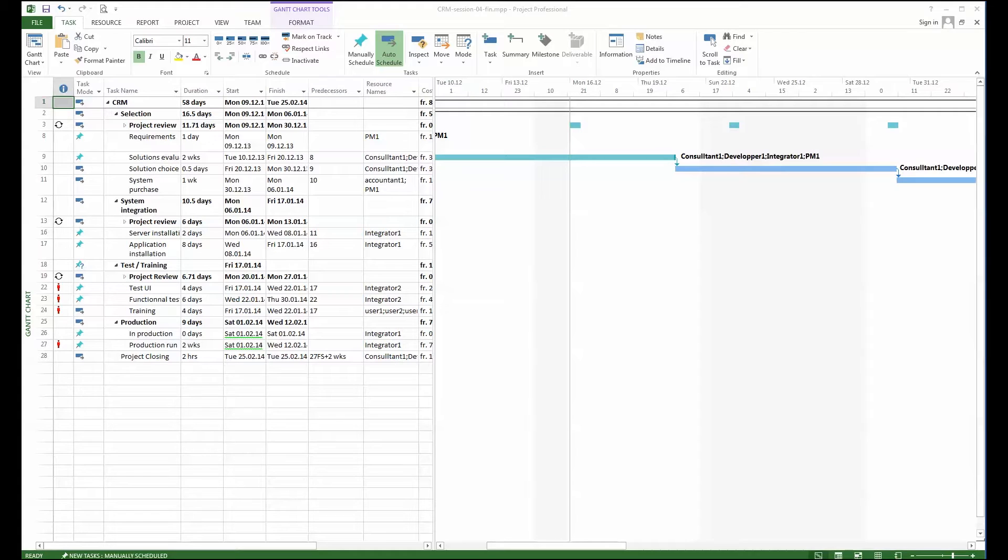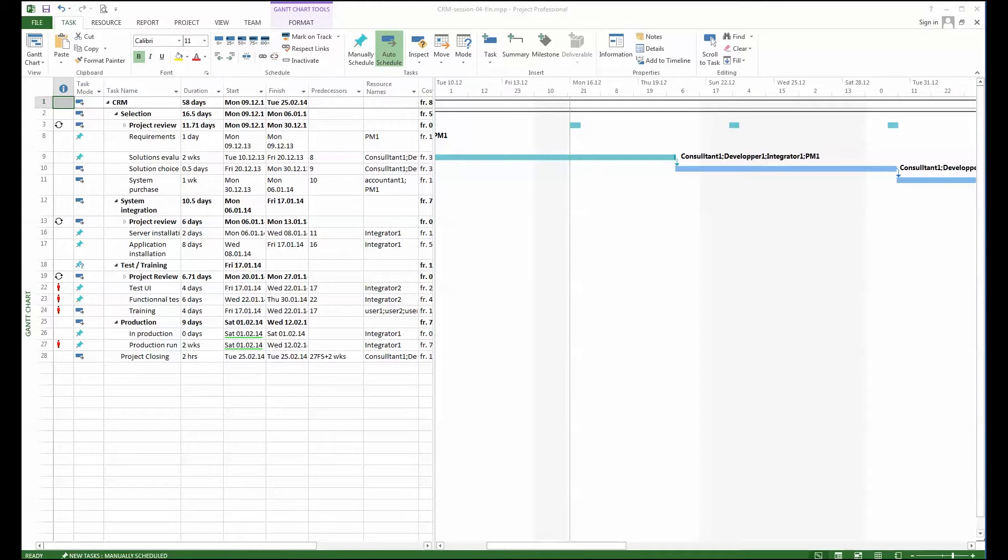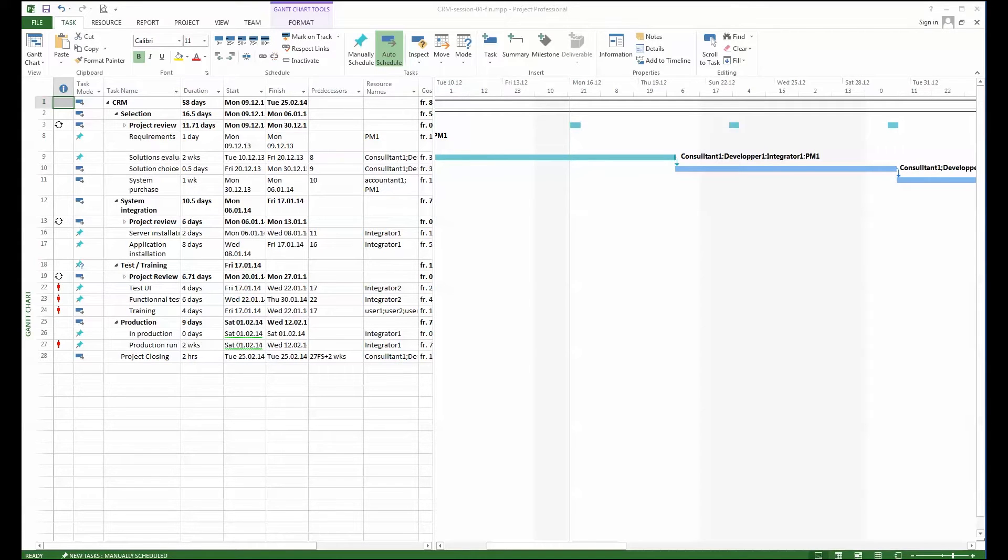To do that we can solve it in a quite simple way. We will create what is called a pool of resources. A pool of resources is nothing else than an empty project where you just have resources. And from the other projects that the different project managers will be using, they will take and link resources from that pool of resources.